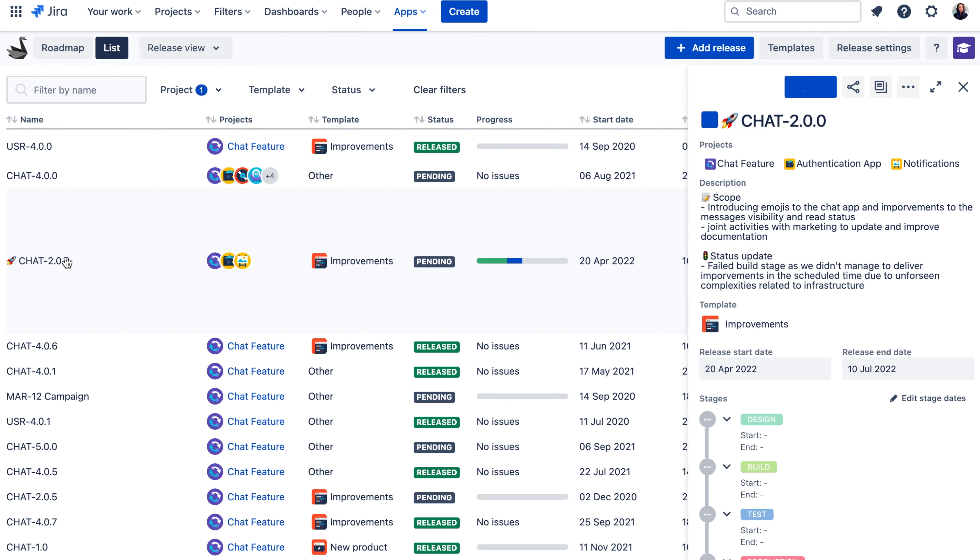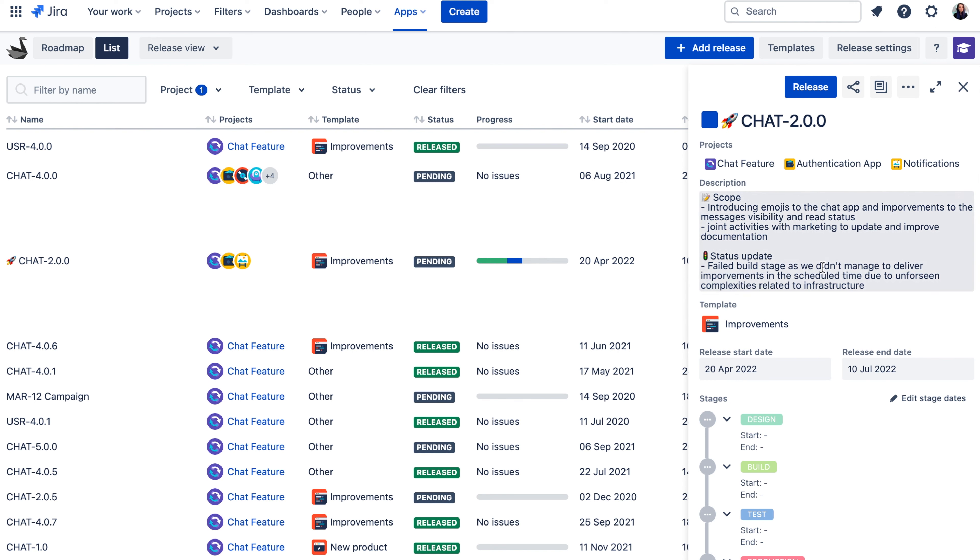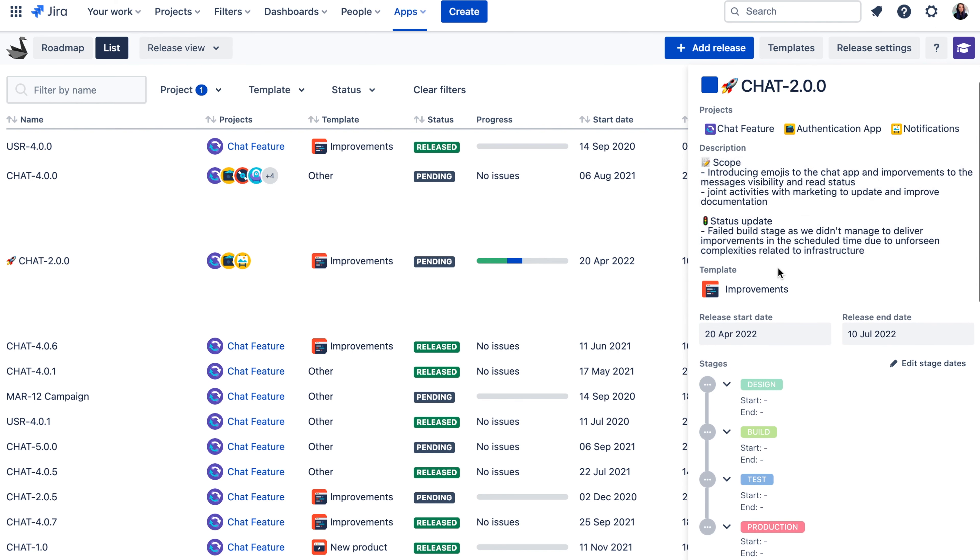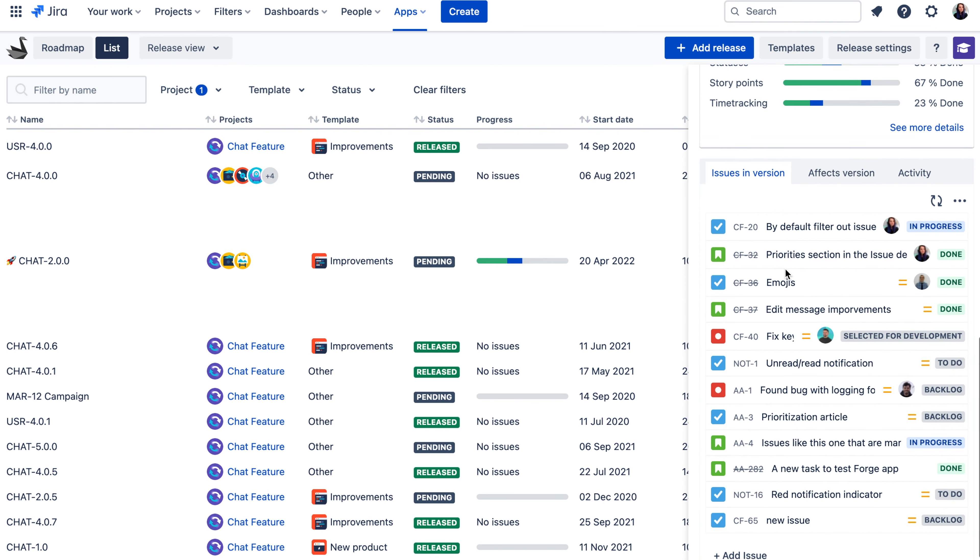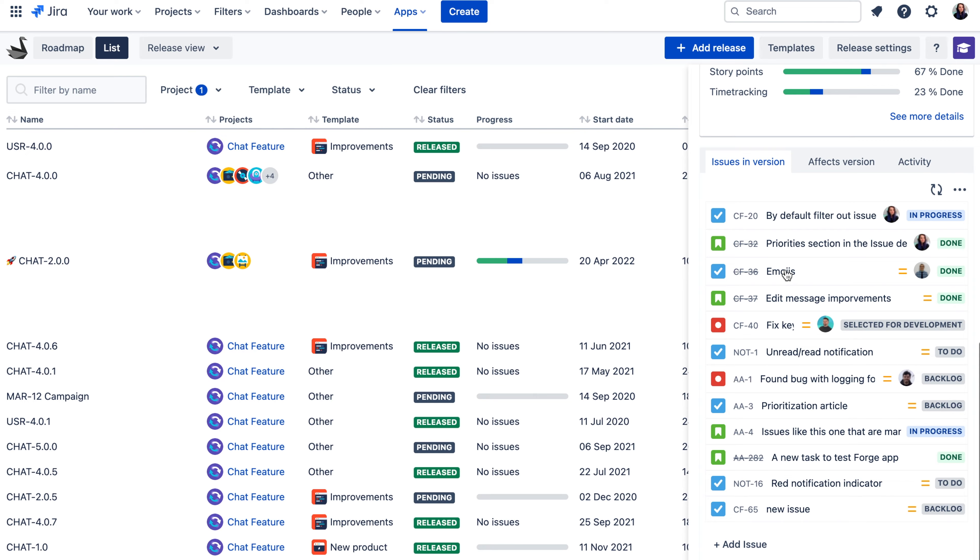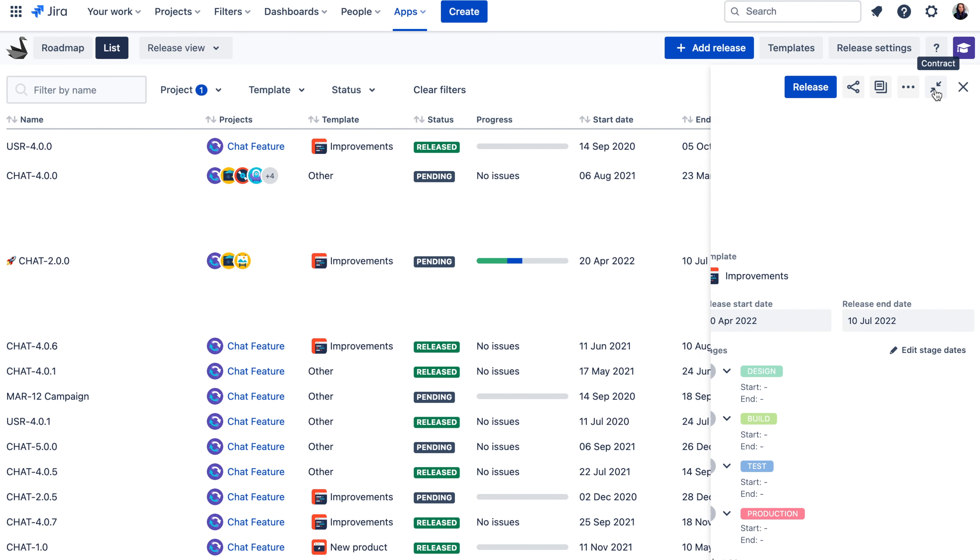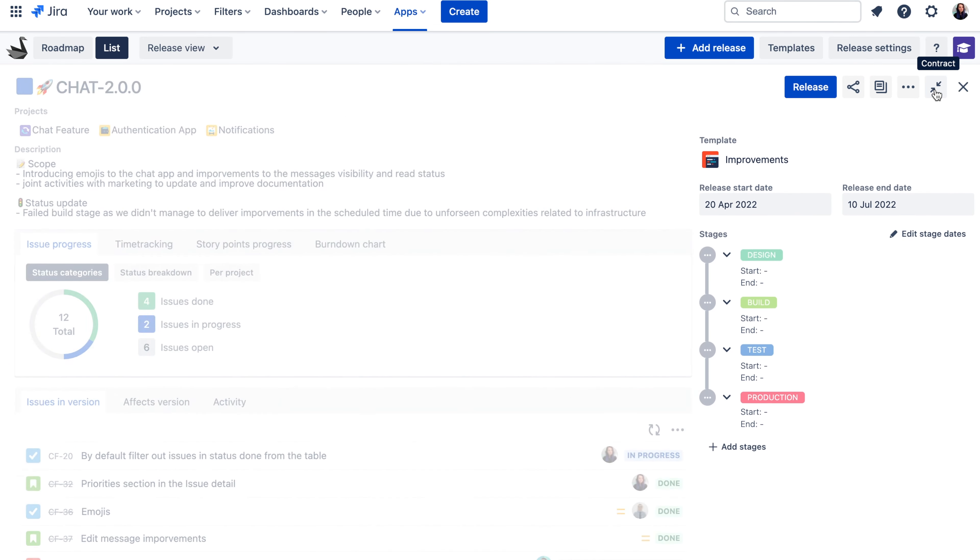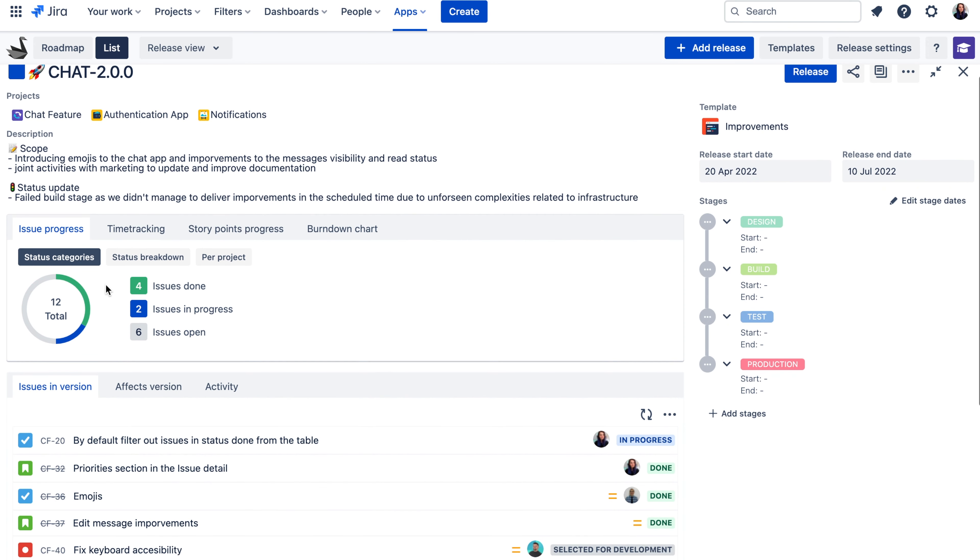And speaking of reports, in terms of release tracking, there are these release reports available that you can access when you click on your release on the roadmap or in the list view. Here you can find more information about the release scope and how much of the scope was done and even a release burndown chart.